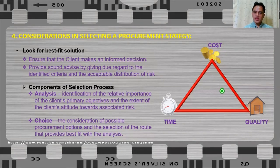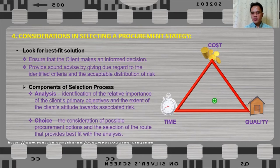If equal emphasis is given to cost and quality, it will also be noted that longer time may be needed to complete the project. Similarly, if equal emphasis is given to time and quality, the client may need to incur more cost in order to satisfy or achieve the objective of its organization. So, once the location of this target is determined based on the analysis of the client's attitude towards these mutually exclusive factors, the procurement route can now be selected.